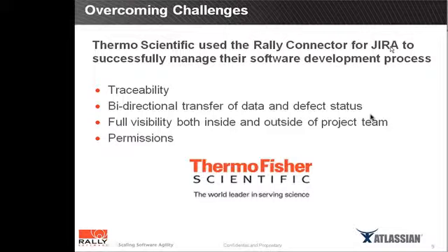In order to be compliant with ISO 13485, which is the quality management standard for medical devices, while at the same time adhering to the principles and practices of Agile development, we've had to be very careful in our selection of tools for managing our software projects. One area that we've had to pay particular attention to is traceability. Our requirements have to be traceable, not only through the acceptance test cases and test results, but through unit tests, through defects arising from acceptance tests, and through the source code check-ins.